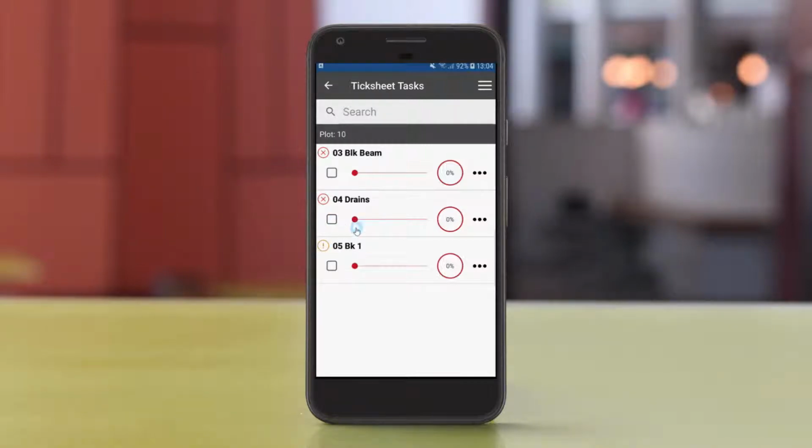So if I click on the drains build stage, that is set to be 100% complete. So are all the other previous ones, because that is a way of setting that in Powerproject. You can do it individually. It's not overridden. You can still say, well, I've only done 50% of that one. So it's just a starting point.